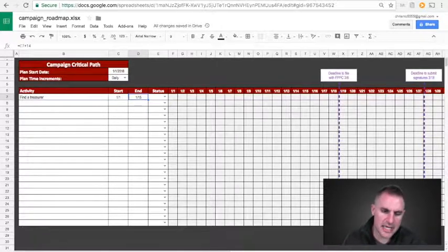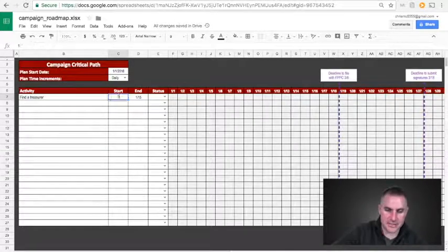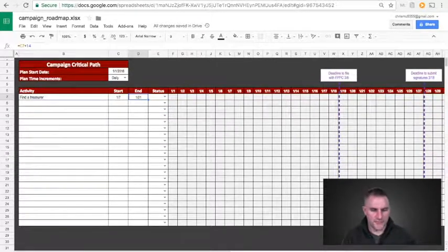That's something handy if you realize, well, actually, I'm going to be on vacation at the very beginning of January. I just remembered. So I'm actually going to get started on the 7th. And then, oh, look at that, your end date just updated to the 21st. So there's a little tip for you guys. But remember where you put in formulas or put some sort of color coding in there so that you know, because when things start updating automatically and you're not paying attention, it can create a hot mess up in here.